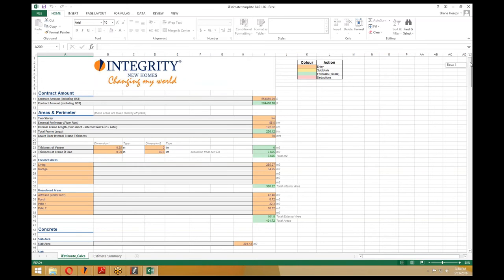This one just here. We'd obviously filled out the contract amount, it removed the GST. Now that forms the foundations for calculating our overheads, calculating the salesman's commission, goes towards our maintenance allowances. Essentially, it's how we determine the general cost associated with a lot of jobs. So we also have the rest of the items here.